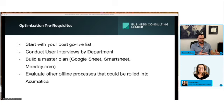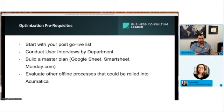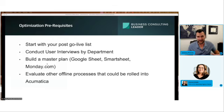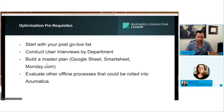The next prerequisite would be to build a master plan. If you are going to treat optimization of Acumatica just like a task that is on your desk, then it will probably fail — you need to include other people. When we've run this, we actually treat it like an implementation project: there are dates, quarterly goals, and we basically treat it like a year optimization. Here's what we're committing to do as an organization to lean into Acumatica further. If you think of it like a project, you even wind up doing things like having a standup every other week or once a month, whatever the cadence is for the amount of optimization work that you need to do.